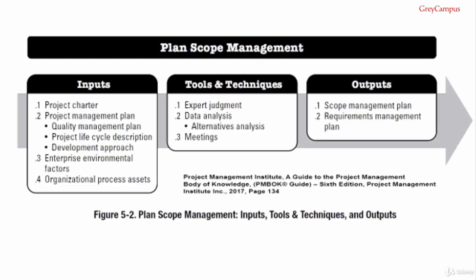Number 2, Project Management Plan. The Project Management Plan is defined as the document that describes how the project will be executed, monitored and controlled and closed. That's an important definition from the PMBOK Guide on page 716. As I mentioned in the Project Integration Management process, the Project Management Plan is a set of all sub-plans and baselines and life cycle for the project. PMI used to call this the project plan, but junior project managers often thought project plan was a project schedule, and so PMI changed the name to Project Management Plan.